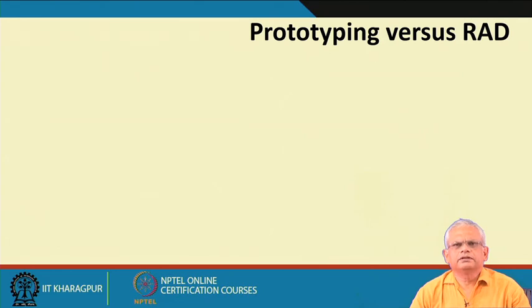The RAD model each time constructs a prototype and gives it to the customer for evaluation, and based on the customer evaluation the prototype is changed, and as the customer gets satisfied, the refined prototype becomes part of the software.